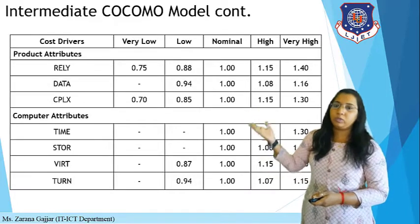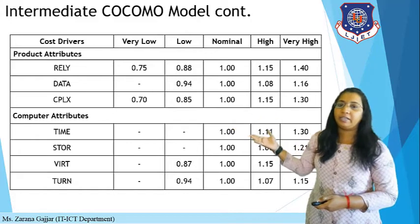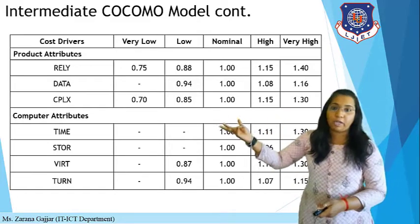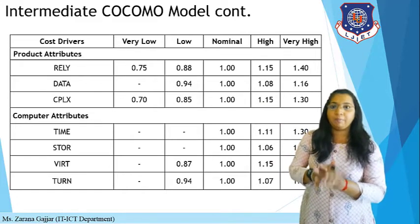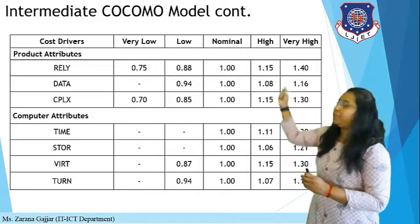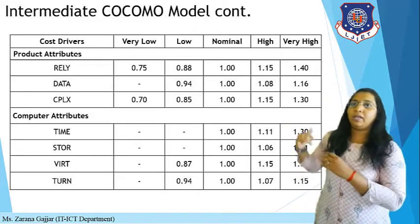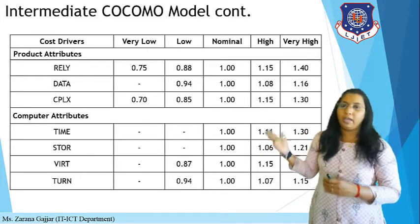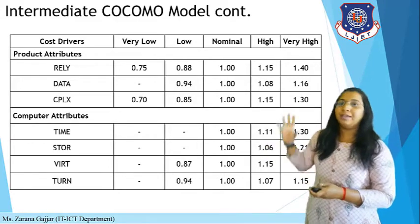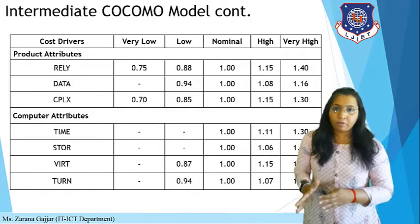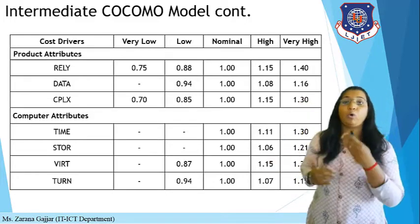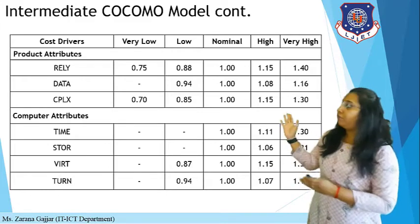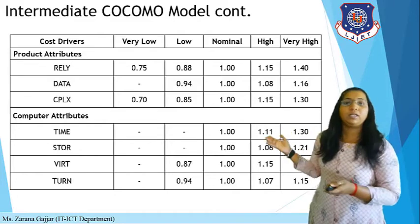All attributes are listed in the table. In product attributes, RELY is for reliability, DATA for database size, and CPLX for complexity — each has different values. For example, if your project reliability is very low, you use 0.75; low is 0.88; nominal is 1; high is 1.15; and very high is 1.40. These predefined values are known as the Effort Adjustment Factor (EAF). You multiply all the relevant factors together to calculate EAF.